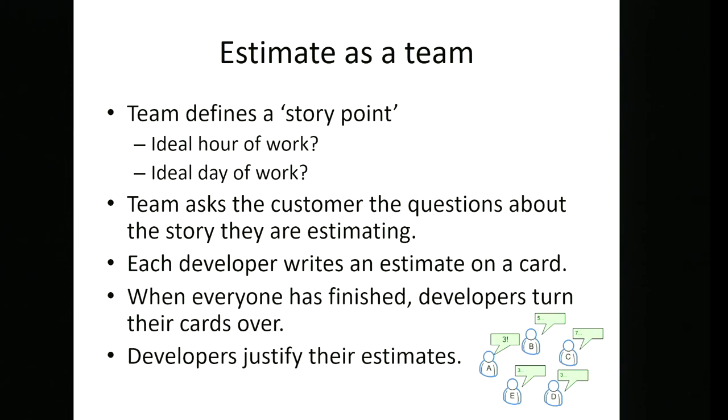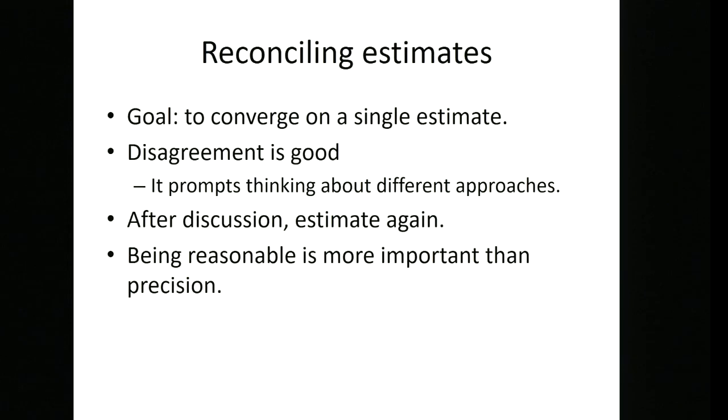And this is a way of exposing people's concerns or thoughts about the actual task, but without having a situation where you're in a consensus. Because when you start talking straight away, it is often the case, not always, that certain people have more experience, or there are stronger voices in the team, and they'll just say, oh, I think it's this, and everyone will go, yeah, that's right. Whereas if you have to have written something down yourself, and then you have to justify it, you may come up with something that people say, oh, actually, yeah, that's a really good point. We haven't thought about that. So you then go through the process again.